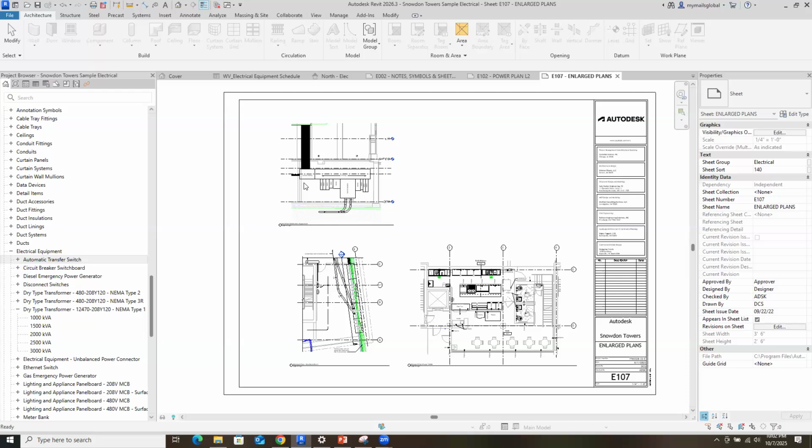Now we'll see what are the different phases of the project. There are pre-project things we are doing. Then we do some initial project setup. Then there are certain modeling standards we are using. Then when the modeling is done, we use coordination and QA/QC is being done. And then lastly there are the deliverables.